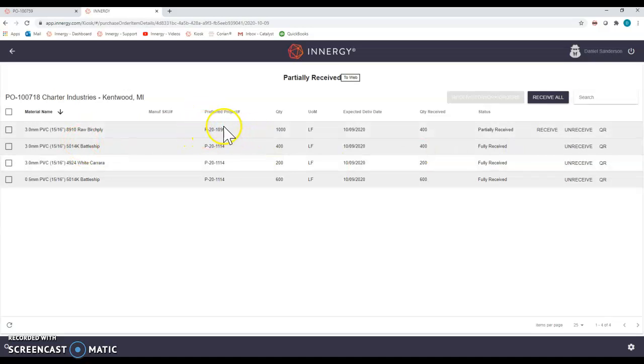It's tied to a project, which is fantastic, and I think that's probably the way that it should be, just tied to a project. But right now, I receive to a work order. I don't know what work order this is associated with, and honestly, it's probably associated to multiple work orders. So I don't know why we would be receiving to a work order instead of just receiving to a project. Maybe that's the way it has to be done, but I'm just throwing that out there.